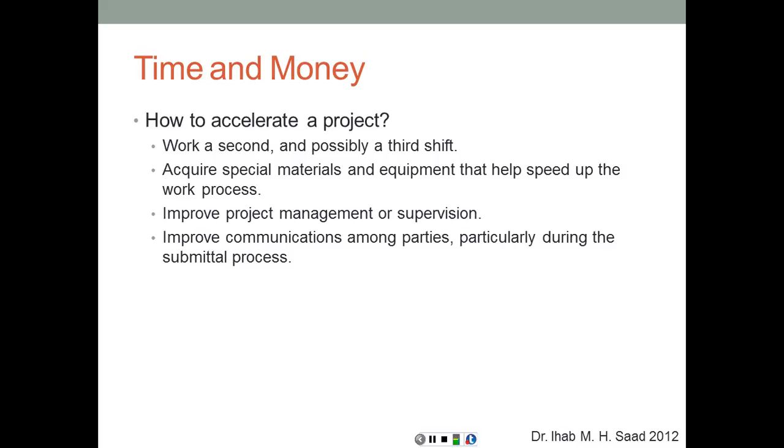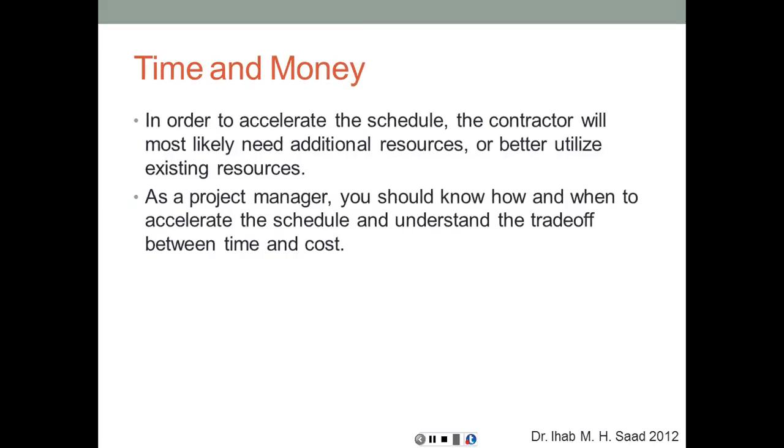Improve communications among parties, particularly during the submittal process, to make sure that we get our submittals on time, we get our approvals on time, and we are not delayed by such paperwork. In order to accelerate the schedule, the contractor will most likely need additional resources or better utilize existing ones. As a project manager, you should know how and when to accelerate the schedule and understand the trade-off between time and cost. Because usually, as we agreed before, time is a resource. You pay money to acquire time. So what we're trying to do here is buying time by doing more in a shorter period of time, and that's going to cost us most likely some additional resources.